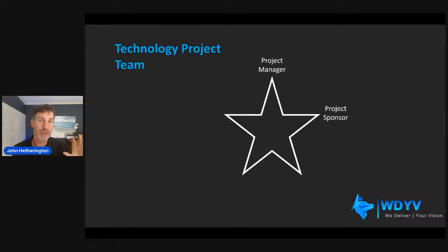What I would say is be aware of what's driving the project. I did mention how you can have 2 sponsors in this role, but just be really, really careful. If budget is your most important driver for the project, then who's providing that budget? If one of the sponsors is in IT and they're providing the budget, then ultimately they're going to have accountability for that project's success, because it's driven by budget.